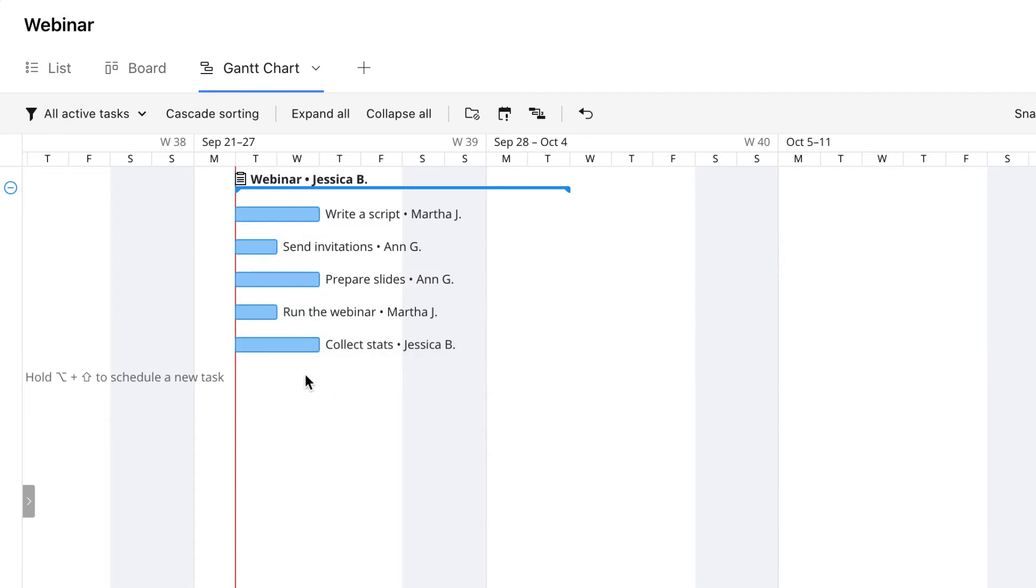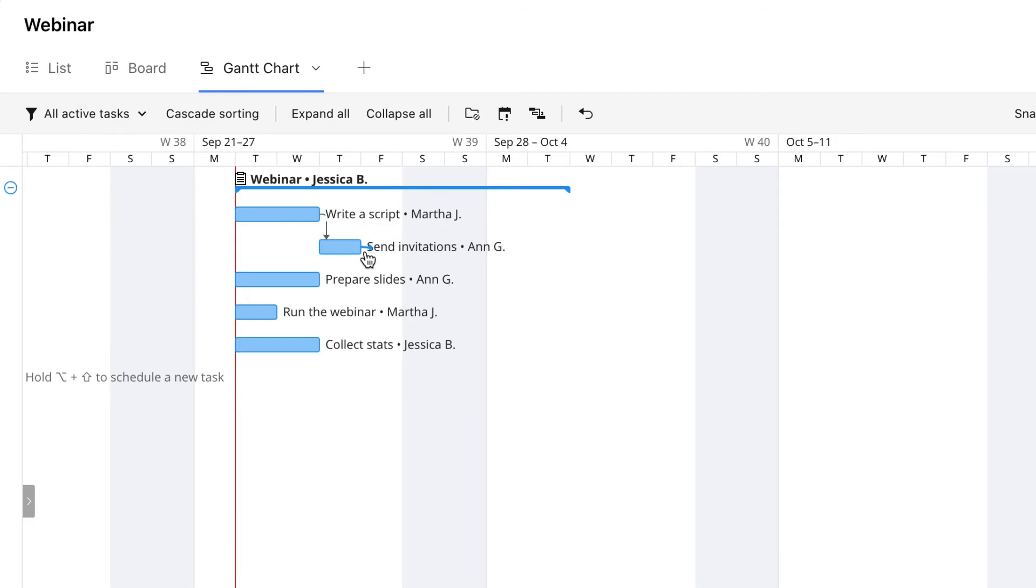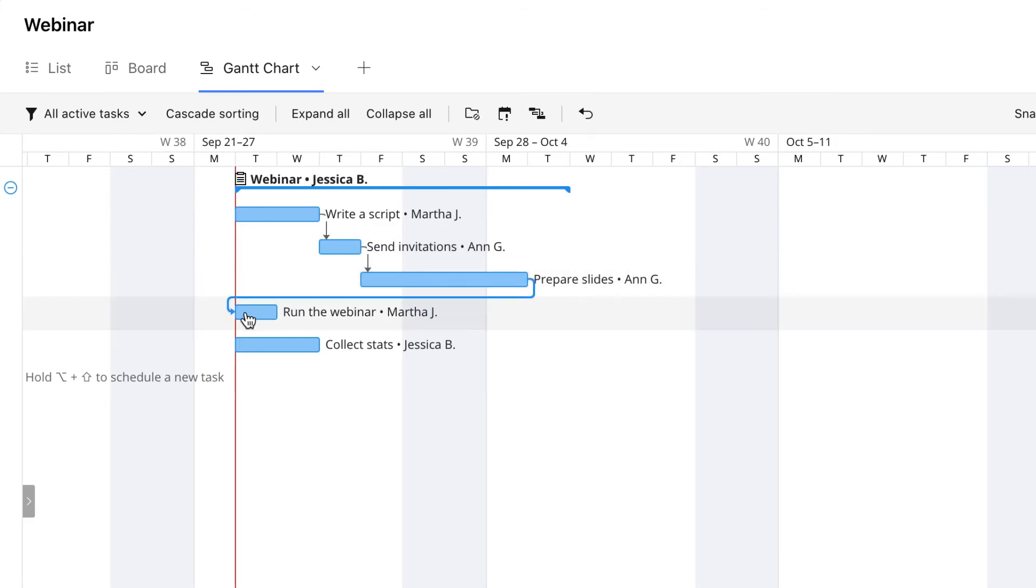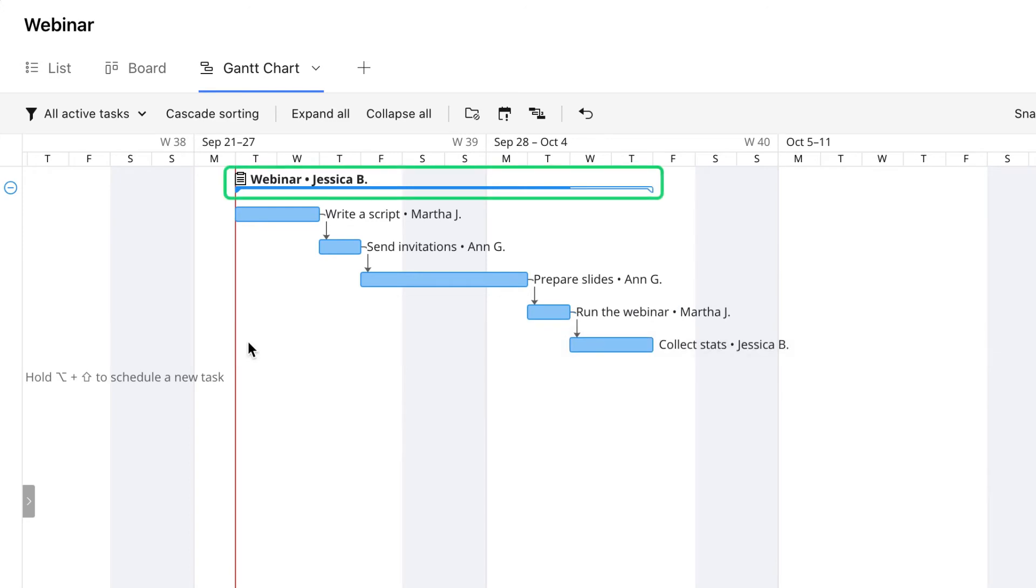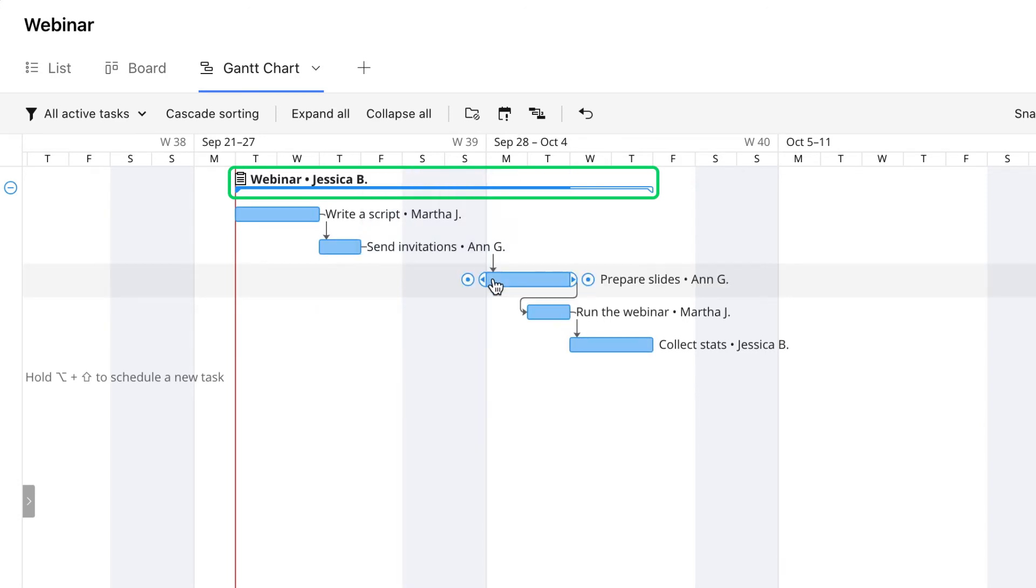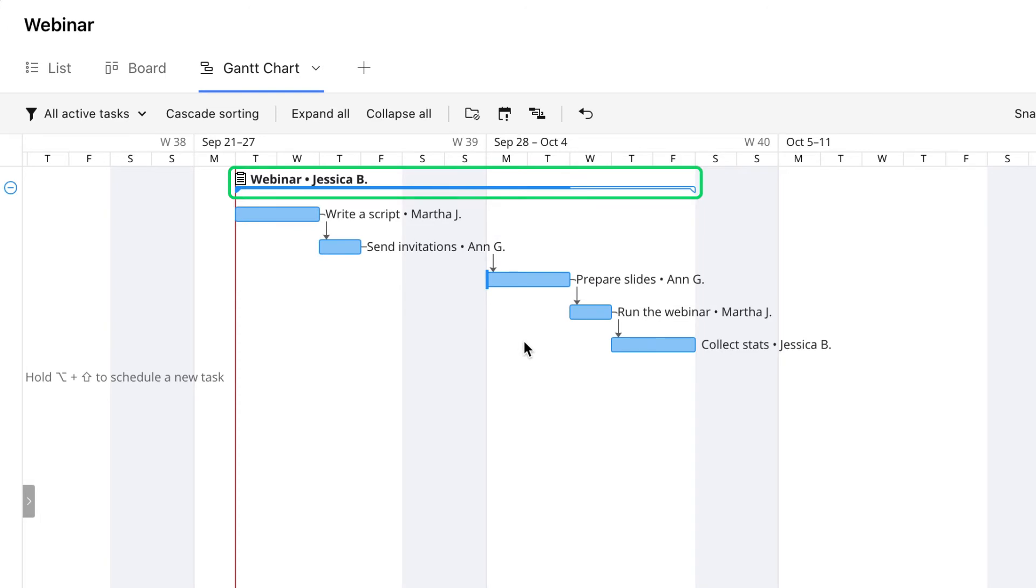The next step is interconnecting tasks with dependencies. There are two main reasons to do that. First, if the tasks are interconnected, Wrike considers the project a single entity, not a set of random independent tasks. So if you need to reschedule a task, all the consequent ones are rescheduled accordingly.